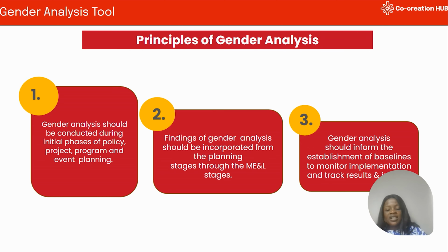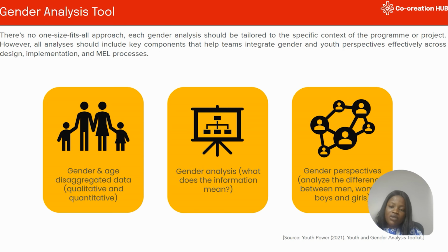First, ensure that gender analysis is conducted during the initial phase of the project. Ensure that the findings from gender analysis are incorporated throughout all the stages of your project or your program. Ensure that gender analysis informs the establishment of baselines, and this baseline will help you to monitor implementation and track results.